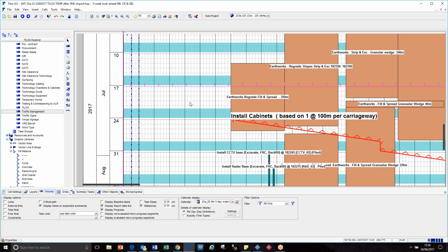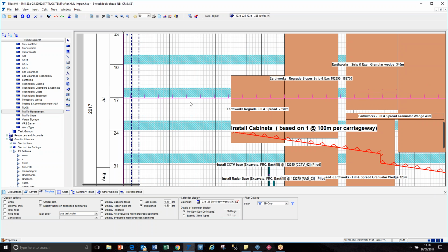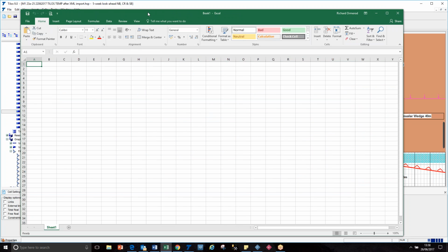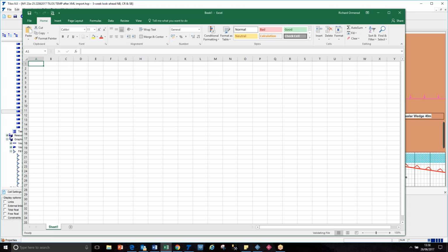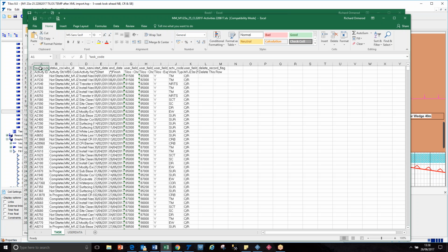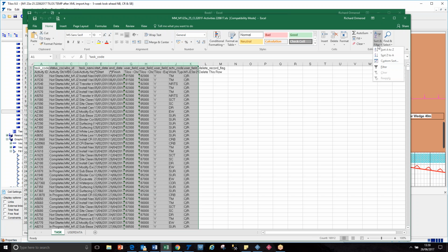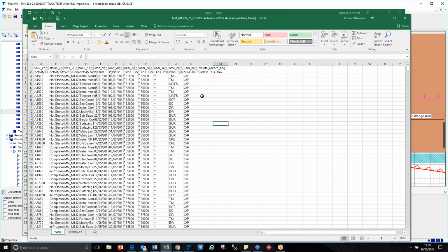Well, this should be looking good this time tomorrow anyway, because we're doing a bit of work in P6, and then it should be extracted in. But I'd urge you, in the email, looking at the spreadsheet that you sent as well, or do another export to a spreadsheet. It is a useful way of finding mistakes, or not mistakes necessarily, but any items missing. So this is what you sent me.